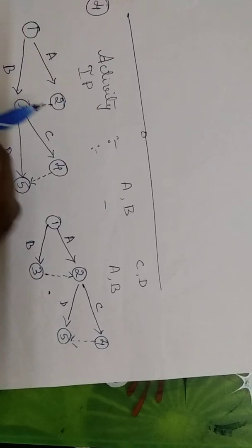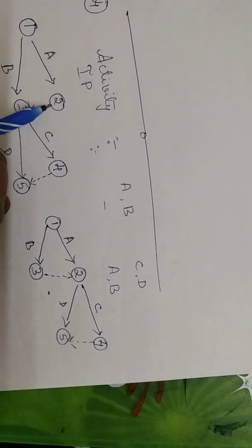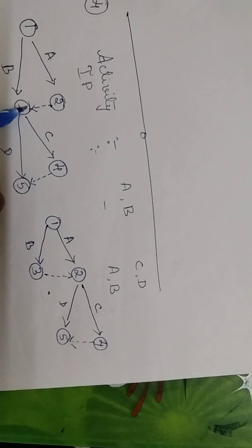So I'll repeat. If you see here, there is a requirement for us to draw a dummy line. When you draw a dummy line, there is no cost involved, no time involved, and no resources does it consume. So this is how it is.